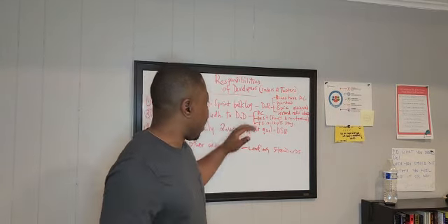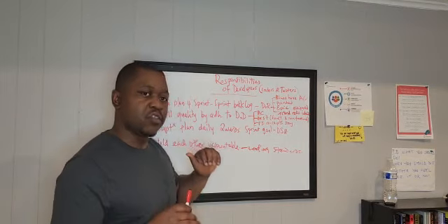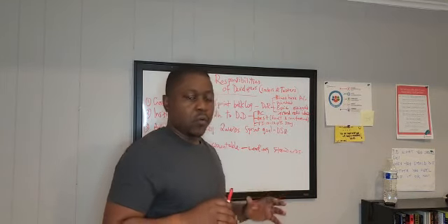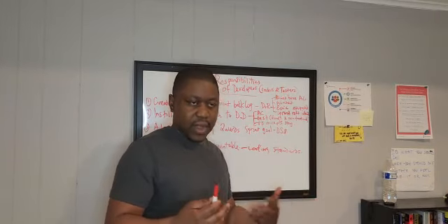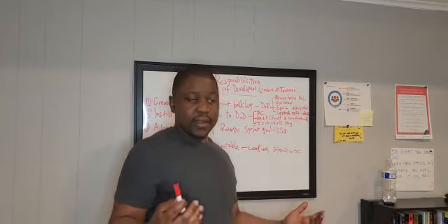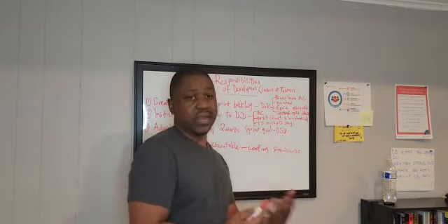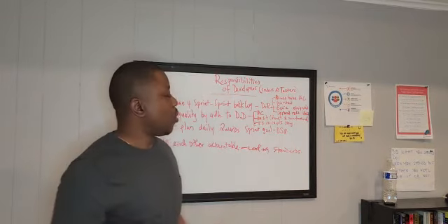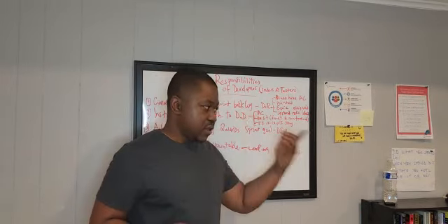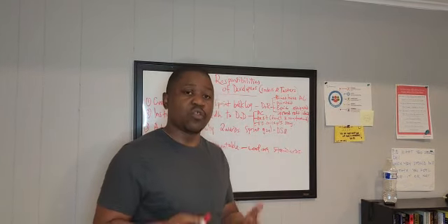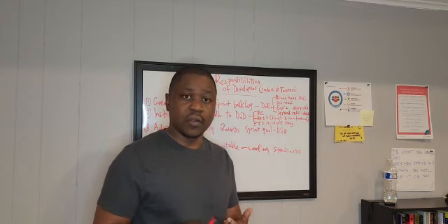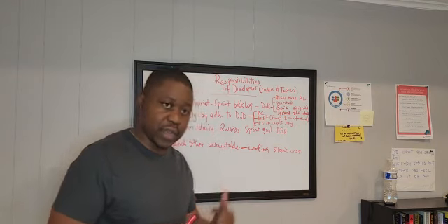So for that to happen, they have to adhere to a definition of done, which could be a standard that the organization has created that all teams should adhere to if it's a SAFe environment, or the dev team has the responsibility to come up with a definition of done that is suitable for the product they're working on.